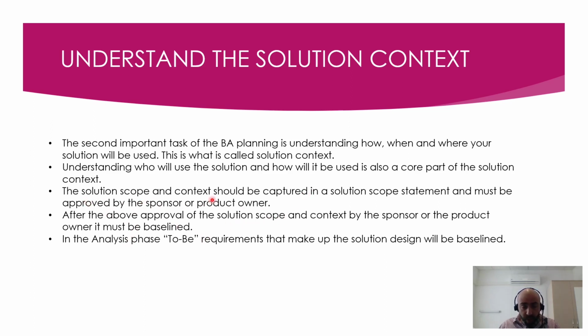The solution scope and the context should be captured in a solution scope statement. Okay? It should be in the solution scope statement and must be approved by the sponsor or the product owner. That's very clear. After the above approval of the solution scope and context by the sponsor or the product owner, it must be baselined. Okay?